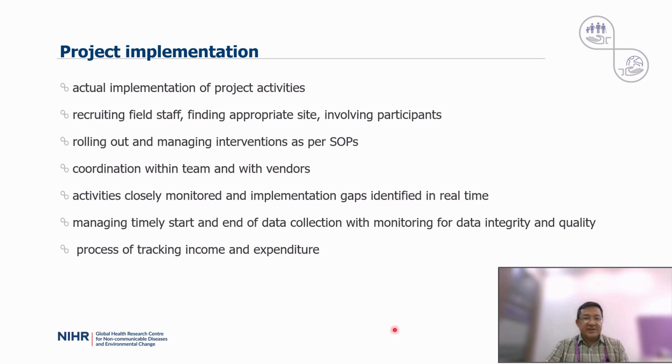Budget management involves the process of tracking income and expenditure during the project life cycle. This task is delegated to the project manager or the project lead, who will be responsible to check expenses against the budget each month.